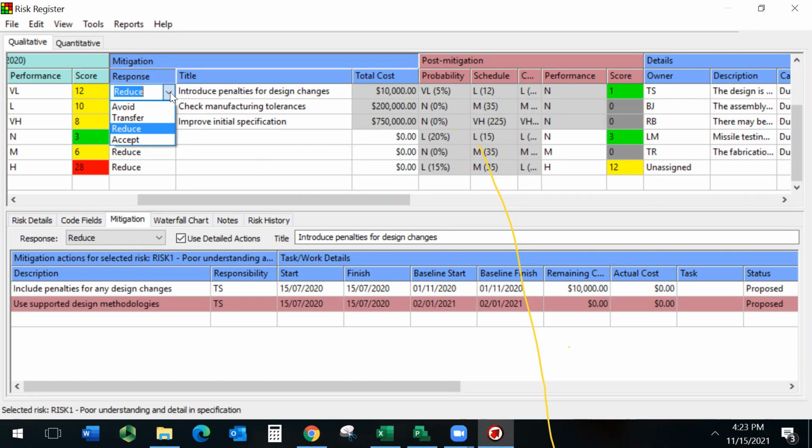Let's say instead of using junior developers, I'm going to use very high-skilled developers. Another way to do it is to change the scope of my project. For the most part, to avoid a risk, you must change the scope of the project or change the plan to complete the project. So by reducing the complexity of the scope of my software, I can avoid the risk of project delay or of having a lot of bugs to fix in the software.